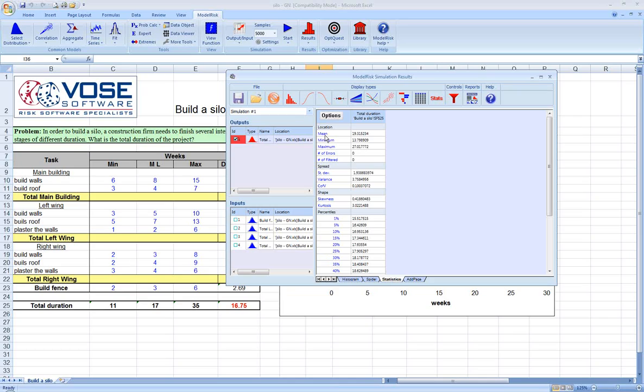But in fact, the mean or expected value from this project is actually 19 weeks, and the maximum was as high as 27 weeks.